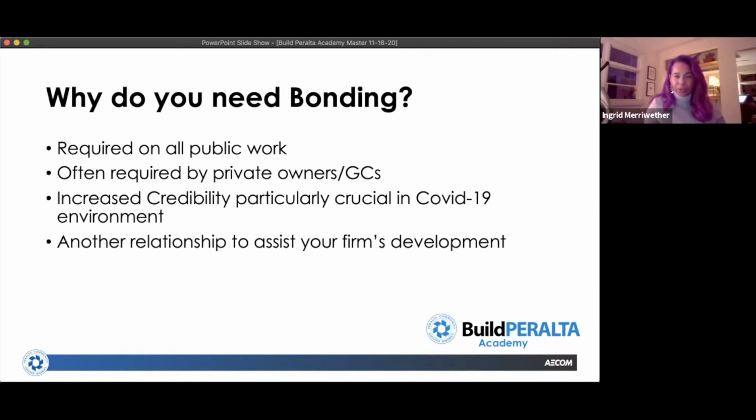of the prime contractor or the hiring contractor, the contractor for whom you would be subcontracting out. So that is really the discretion of individual prime contractors, what their policy is in regards to whether or not they require bonds of their subs. Oftentimes they'll at least want to know, could you provide a bond? Essentially, are you bondable? In some cases, prime contractors will require bonds over a certain dollar amount of a subcontract, or they may require it where it's a new subcontract relationship, or in some cases, they may require it in